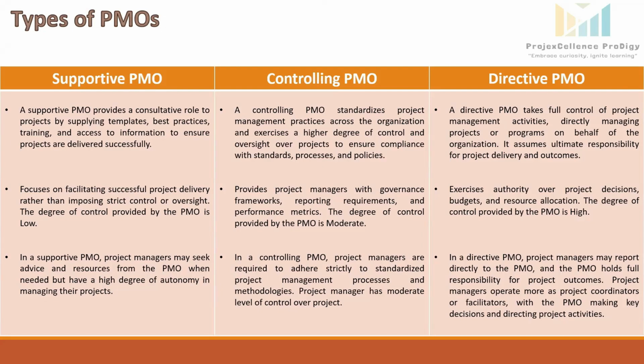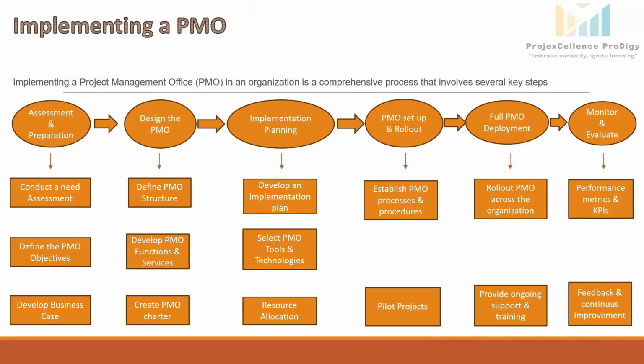So normally NASA's PMOs are highly directive, especially for the large scale mission critical projects like space missions. The PMO directly manages these projects. It ensures strict adherence to timelines, budgets, and safety protocols given the high stakes involved. Next topic is implementing a PMO.